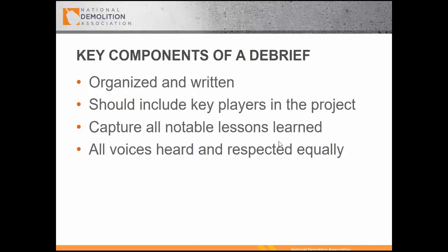So key components of a debrief: organized, written, should include the key players in the project. And I would say that you leave your titles and your positions at the door. You come in, you sit down, you're on an even playing field. Capture those notable lessons learned, again, positive and negative. We have an approach where it's a no name, no blame process to lessons learned. And then let all voices be heard and respected.